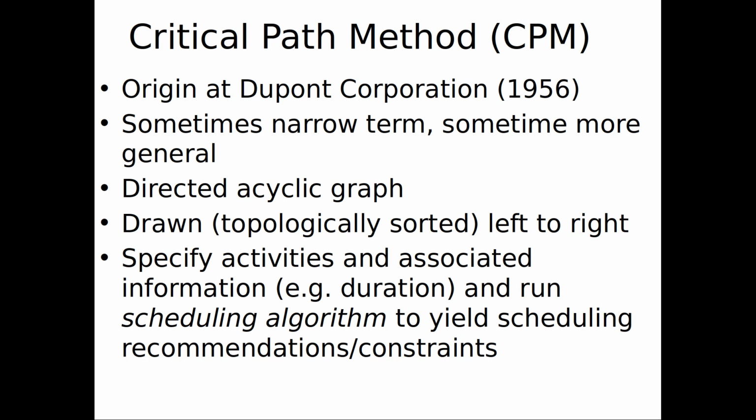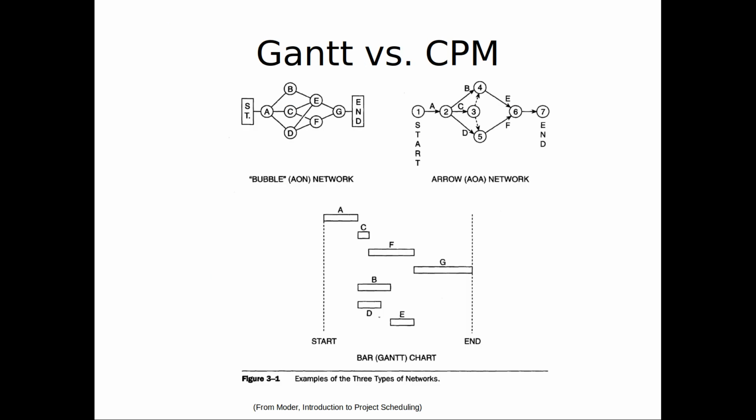The idea here is that you will use a directed acyclic graph to depict the tasks and their dependencies, and you will run an algorithm, which is a very simple, very intuitive algorithm that consists of two phases, forwards and backwards, in O of n time. So the runtime scales linearly with the number of nodes in the graph. And you will use that to figure out how long a period of time the entire project requires.